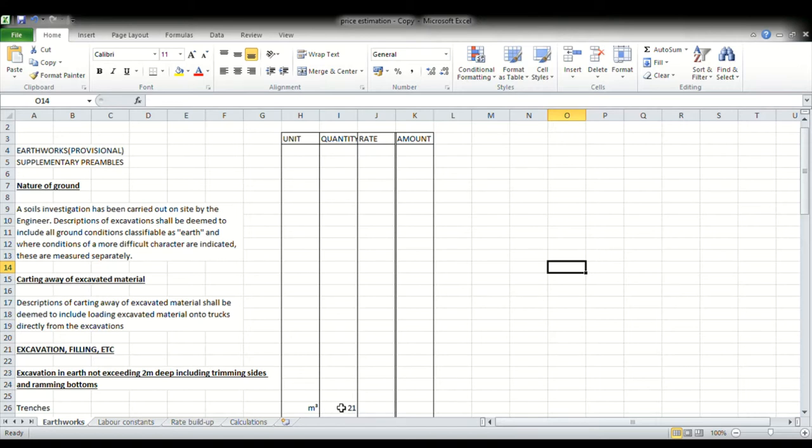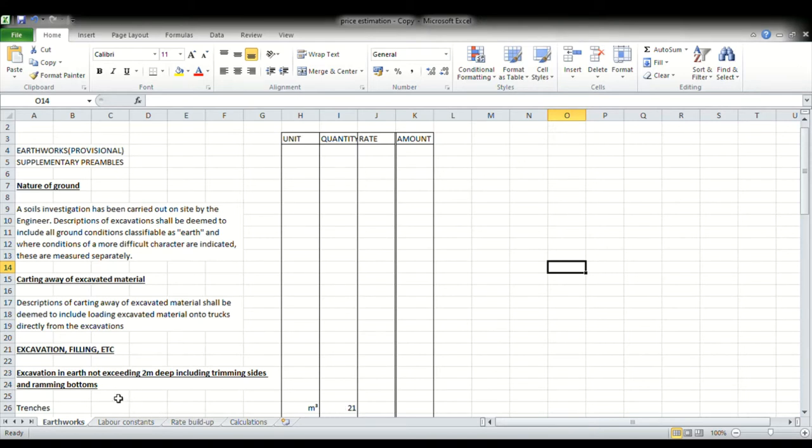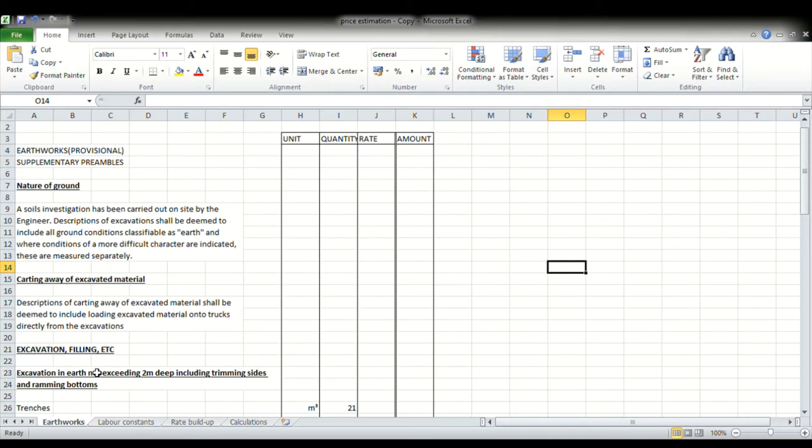Now to estimate the rate for that item, we first need to consider all the cost aspects associated with the item of work. To ascertain the cost aspects, the contractor or estimator would have to study the specifications given to him. Now from reading the spec, we can extract the following information: excavation in earth not exceeding two meters. So the first thing that we can see there is that we are going to be doing some excavating. Now excavating basically involves the ground being dug up and thrown out so that a hole or trench may be formed. The second item is trimming our sides, that's just leveling the sides and ensuring that they are perfectly level.